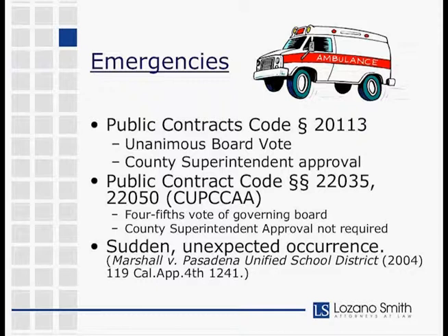The rules under cupcake are cited there, and the major differences are, number one, the district only needs a 4/5 vote of its governing board. The other difference is that the cupcake district does not need county superintendent approval.